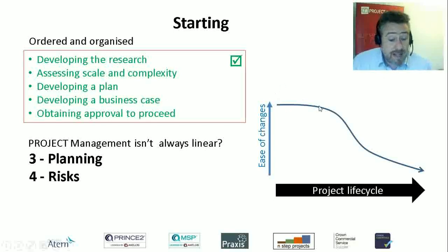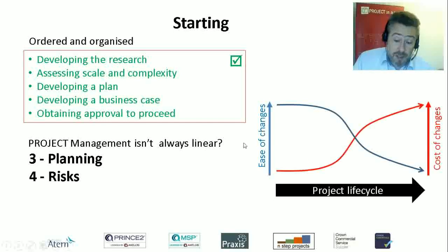Actually, as we get further into that can start to become a challenge, because we'll have to rework existing plans and sections if we start making changes. But as we progress further on and we start to perhaps let contracts, buy things, organize things, start to put things together and assemble them perhaps in a real world sense, that all becomes more and more difficult to then go back and make changes. Might have time impacts, will certainly have cost impacts. So the cost of change also goes up in a similar way. So ease of making change goes down, cost of making changes goes up. And for all those exactly same reasons.